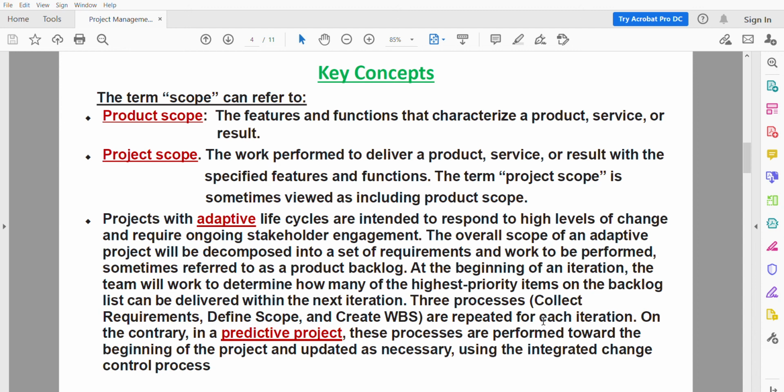The requirements management process starts with a needs assessment, which may begin in portfolio planning and program planning or within a discrete project. The role with responsibility to conduct business analysis should be assigned to resources with sufficient business analysis skills and expertise.